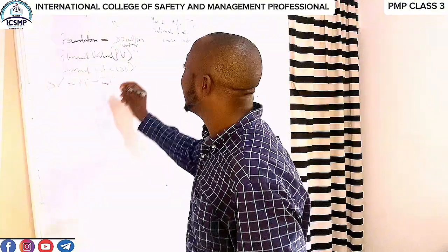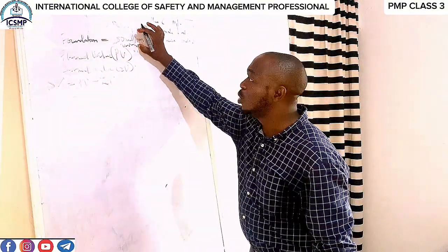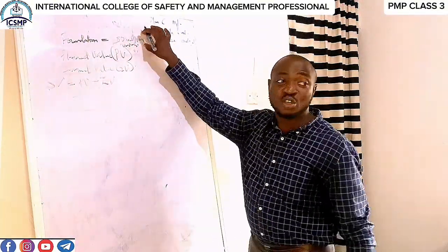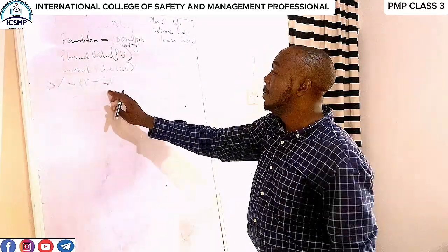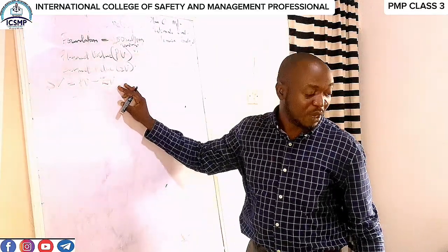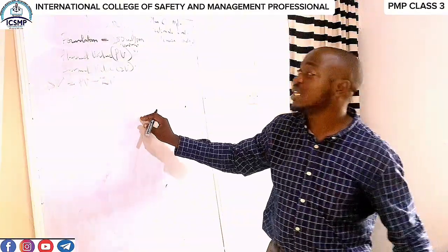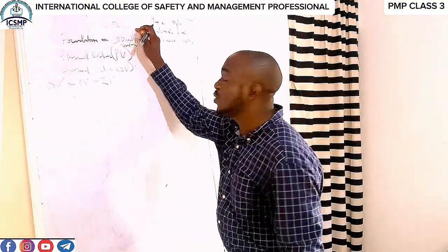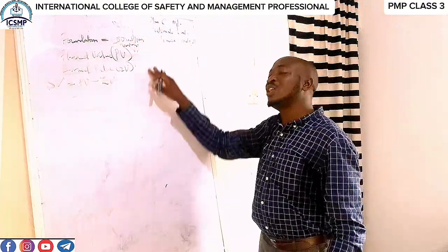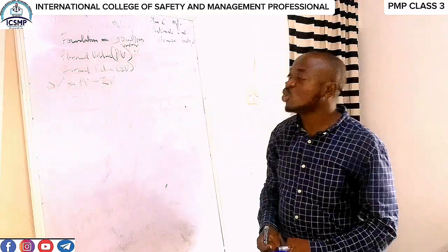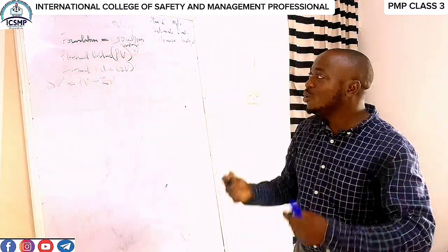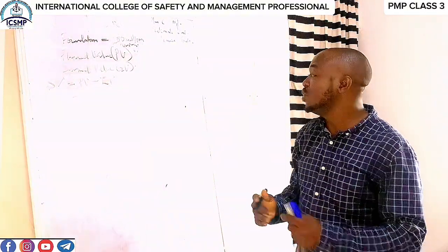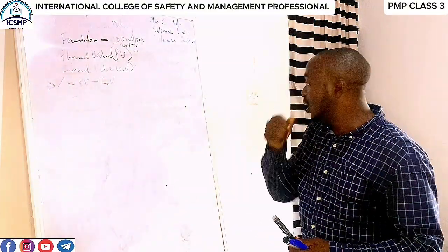So for example, if we say we are going to spend 200 million to complete the foundation, and at completion of foundation we find out that we spent 195 million, you know that your cost is performing. And at the same time, if we say we are going to spend 200 million and we have spent 310 million, then we know that our cost is failing. So it is a cost evaluation tool that we use to evaluate the performance of cost.